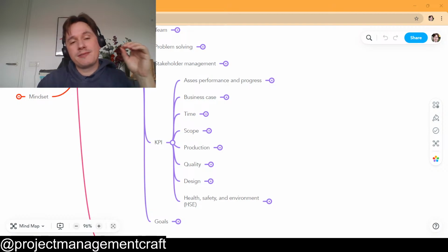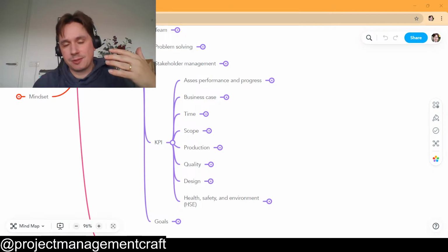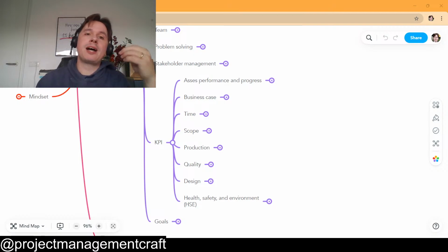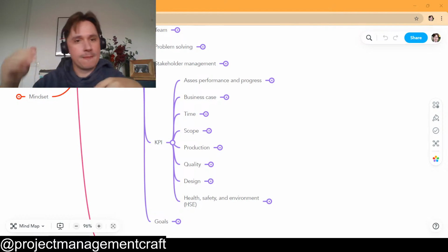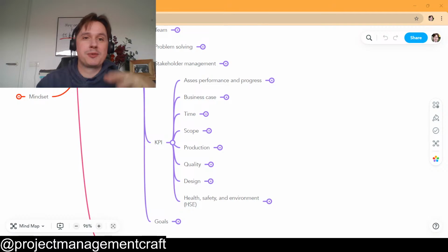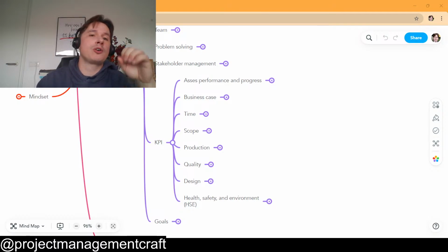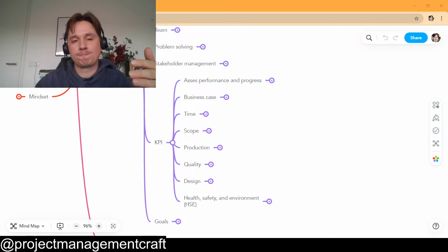So it's very important that you define a KPI that makes sense and helps you track progress, but also that you have a good procedure and work in an effective way. This case where the manager was quite extreme, doing that for an entire department, is one thing, but I've seen other project managers in other companies who, not uncommonly, don't want to report a red KPI, so they keep reviewing the baseline.